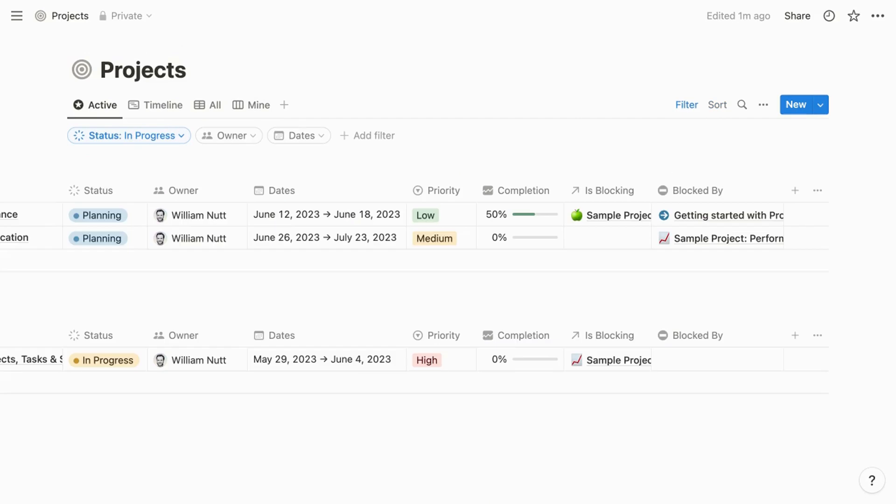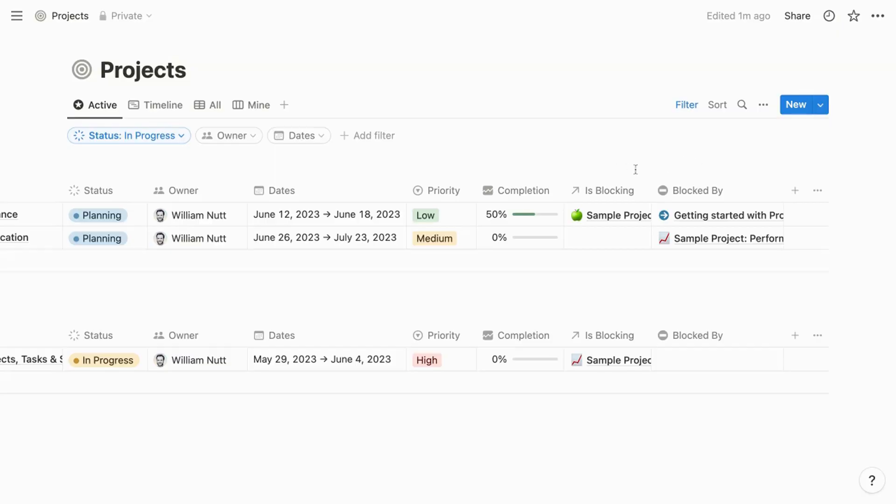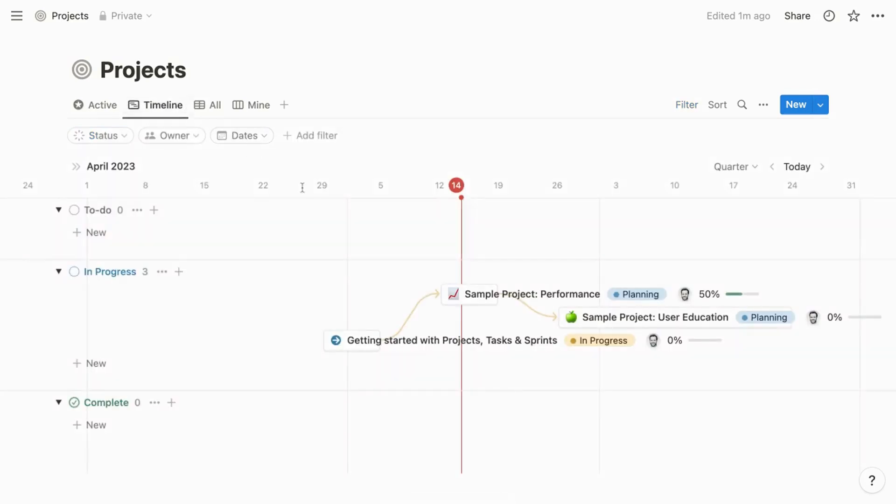A few properties worth calling out are the completion property, which is a roll-up property. It displays the percentage of the project's related tasks that are marked done. I actually prefer the name progress for this property. That's among the changes you'll find in my template version of Notion Projects. The IsBlocking and BlockedBy properties are relation properties. IsBlocking is what informs the dependencies in the timeline view.